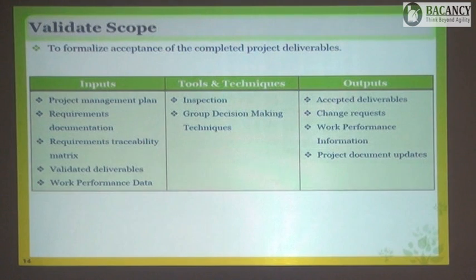Now the type of contract you have, suppose it is cost reimbursable or time and material. If it is a fixed price contract, then what do you do? You have to send a variation request. No. If it is a fixed price contract, it is your mistake because you were not able to visualize the factors which can impact you in future. Even a lump sum contract? Fixed price or lump sum contract is the same thing.